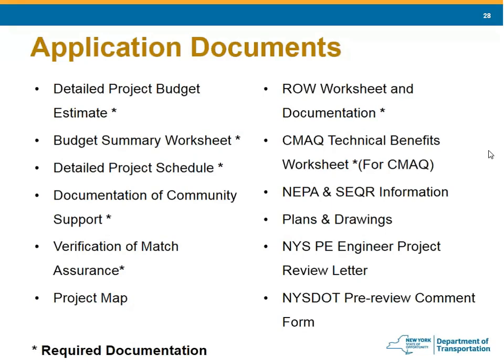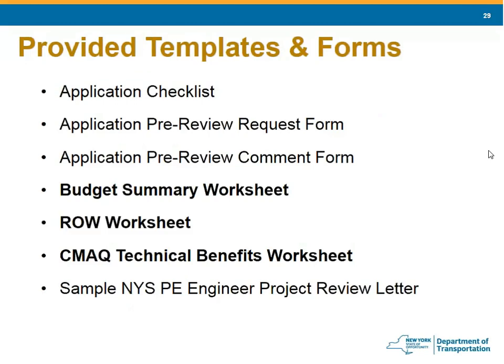Other documents needed to complete the application include: a detailed project budget estimate, the budget summary worksheet, detailed project schedule, documentation of community support, verification of match assurance, a project map, the right-of-way worksheet and documentation, the CMAQ technical benefits worksheet, NEPA or SEQR information, plans and drawings for the project, the New York State PE project review letter, and the NYSDOT pre-review comment form. Some of these documents you supply; others are provided in the Grants Gateway. Those with asterisks are provided in the gateway — the others can be located on the TAP-CMAQ website. Helpful checklists and required forms are in Appendix F — bolded items are in the Grants Gateway.